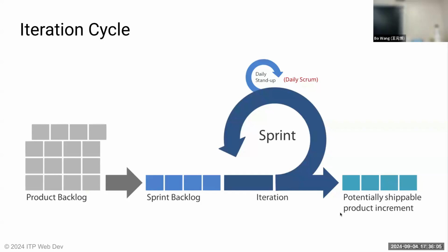So you will literally present something to your product owner and say, hey, this is the prioritization that you gave me, and you wanted me to do this for the last sprint. Is it what you want? What do you think about it? Do you like it? If you do, we're going to do more on top of this. If you don't, guess what? We just wasted one sprint. But that's so much better than wasting half of your work for the past year, right? So a sprint is a very small iteration, but it mitigates the dilemma between you and the product owner. Okay.